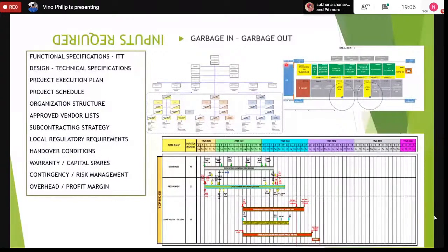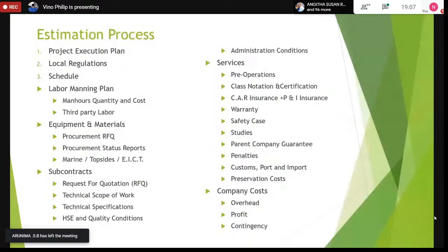We have to take out the old living quarters and put a new living quarters, which will have to accommodate about 160 to 120 personnel on board. That is the number of people, staffing required on the vessel, on an FPSO vessel, to manage all the components, the marine side and the mooring side and the topside production side. So that's why we have to issue subcontracts to the shipyard to convert the living quarters.